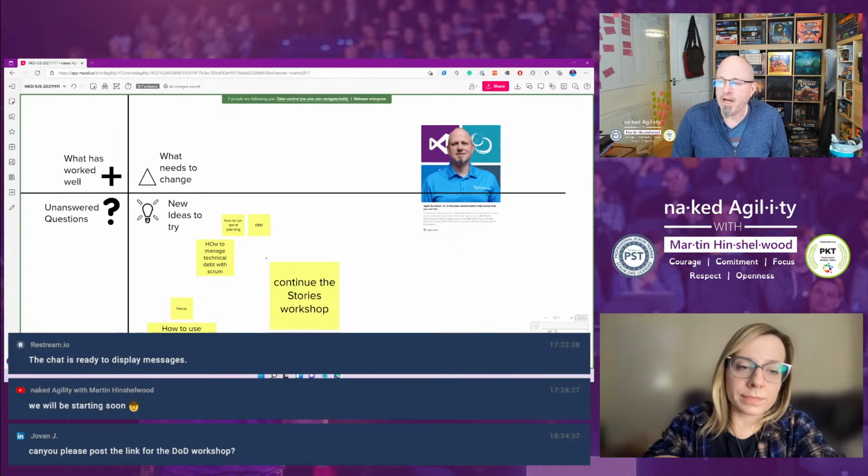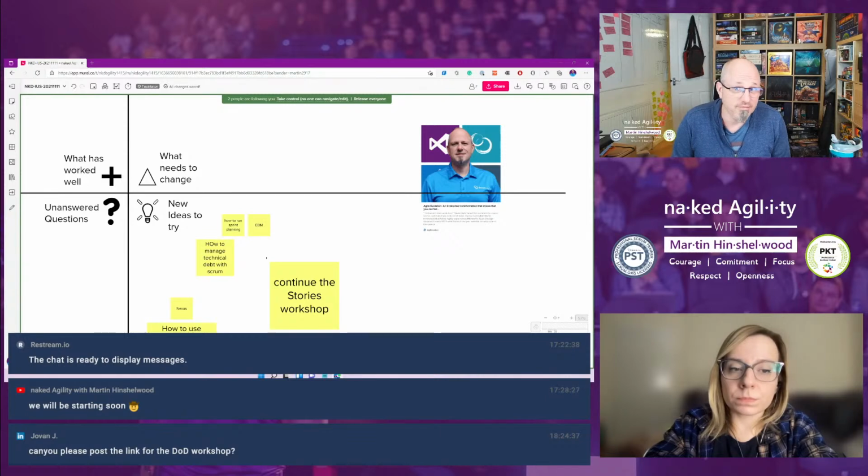So I don't want to have that assumption, but having a place where I can see all of the user tickets and then break them down into things that go on my backlog, I'm pretty good with that. But I definitely don't want a one-to-one relationship, because one user ticket might turn into 5 backlog items, or it could be various things. It doesn't have to be one-to-one. What are you doing just now?